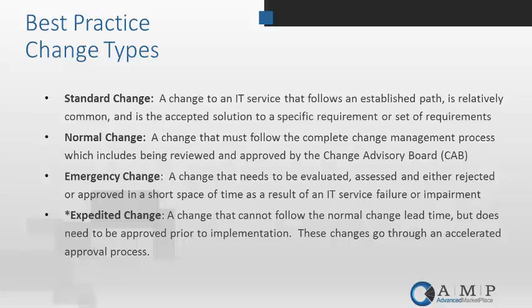But to go back to the top two, the standard change. Again, standard changes should be those changes that your organization defines as low risk. I will say that, in my opinion, there's no such thing as no risk. So anytime I've seen that on a tool, I kind of laugh, because everything has an amount of risk to it. But these are low risk changes that your organization as a whole has decided that you don't need to collect formal approval, because the change has been done repetitively, or the risk, again, is very low to the organization to be done.